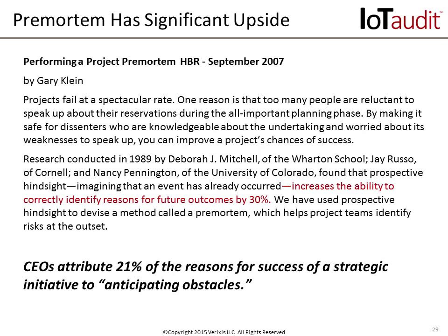Here's some additional information on the pre-mortem. It really does have significant upside. The project pre-mortem idea was discussed by Gary Klein in an article in the Harvard Business Review back in September of 2007. And it talks about how projects do fail at a spectacular rate. The reason is many people are reluctant to speak up about their reservations during the all-important planning phase. By making it safe for dissenters who are knowledgeable about the undertaking and worried about its weaknesses to speak up, you can improve a project's chances of success.